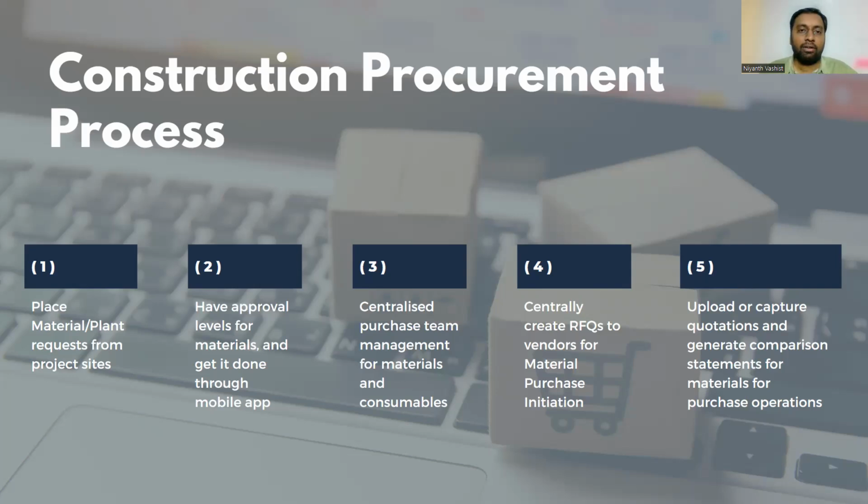So it is very important for the contractor to be transparent and say to the client, sir, this is not going to work. This material cannot be procured in the same time. Hence, let's go with another material. That is very important, being transparent, especially in terms of materials. Because if material delivery becomes late, the client will easily blame the contractor. That is why it is very important to be transparent. So the second step is to have approval of all the materials.